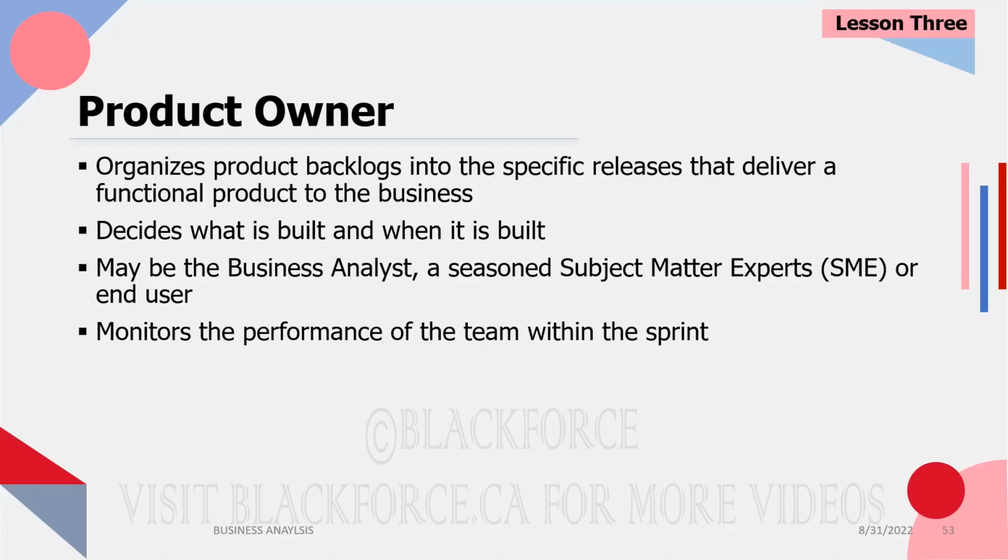So the first point, we talked about them grouping the stories into releases, right? So let's say for this release, there are 20 user stories in there. The product owner does not have the power to say, oh, for these 20 user stories, we're going to start with number 8, then we go to number 9, then we go to number 5. No. Only the people actually building it, and by build, I mean coding, the programming, right? They are the ones who have the right to determine, is it going to be user story 8 or user story 12?